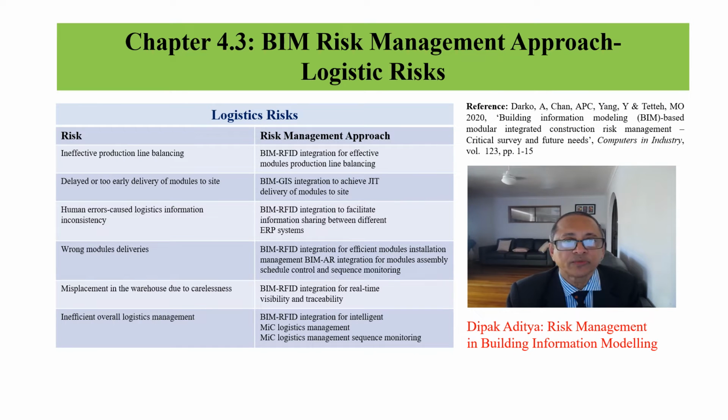BIM risk management for logistic risk. The approaches are BIM RFID integration for effective module production line balancing, facilitate information sharing, and module assembly schedule control. BIM GIS integration for delivery of modules to the site, and the MiC logistic management and sequencing.